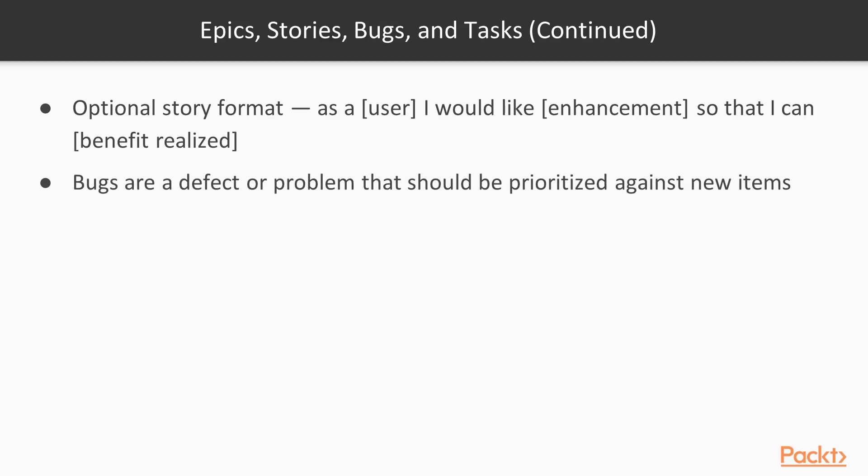We'll also look at bugs. Bugs are what we would call a defect or they're a problem. In Jira, there's something that we'll prioritize against a new feature. So, do we want to take the time in this sprint to fix something or do we want to create something new? And you should be prioritizing those two things against one another.